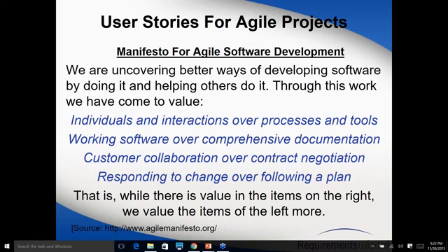So this is what the contract negotiation is. As a PM, I will basically negotiate with my customer, saying that because you locked down the phase and we approved the requirements, if you want to add any new requirements, you have to go through a process called the change control process. As compared to that, in Agile it is not like that.